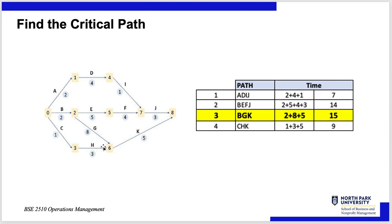Treat non-critical activities like your critical path at the beginning — get them done, snap snap — or reassign those freed-up resources to G. Taking the people from C and H and putting them on G could help, maybe splitting G into two parallel paths if the task is amenable, shaving a day or two.